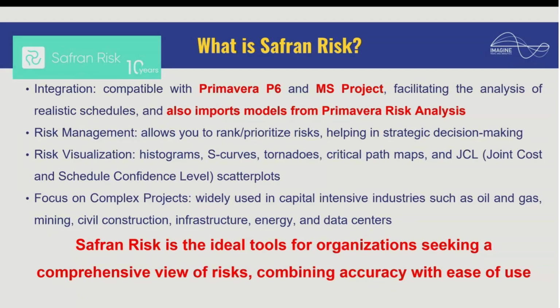You can also import the risk model from the old Primavera risk analysis software, which has been around for a long time. It's now declining in use. Fewer people are using it because of the legacy issues and even IT security issues that it has. So fewer and fewer people are using Primavera risk analysis, but still a lot of people use it. So we can import the model, I think it's RNX, the file extension that you can save from Primavera risk analysis. You can import that into Safran Risk, and then you have your model halfway through, almost ready to run the analysis.